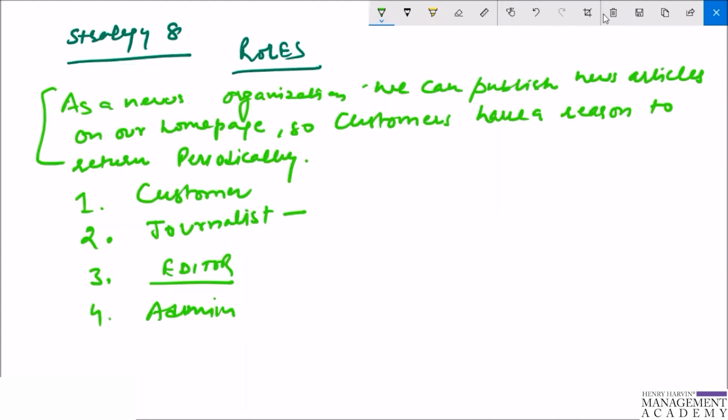So by breaking down the functionality into the roles that perform parts of that functionality, we more clearly understand what functionality is needed and can more accurately estimate the work involved. So writing user stories is a great way to apply this strategy.